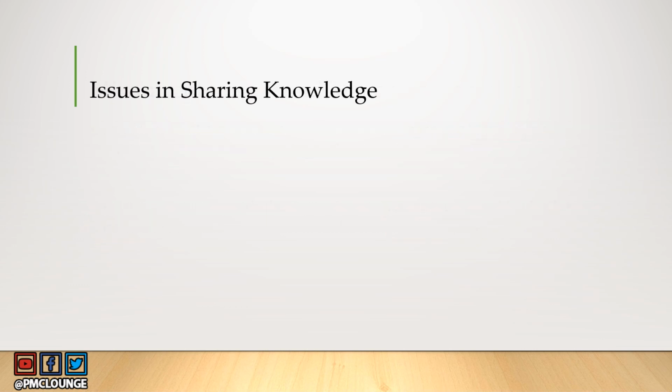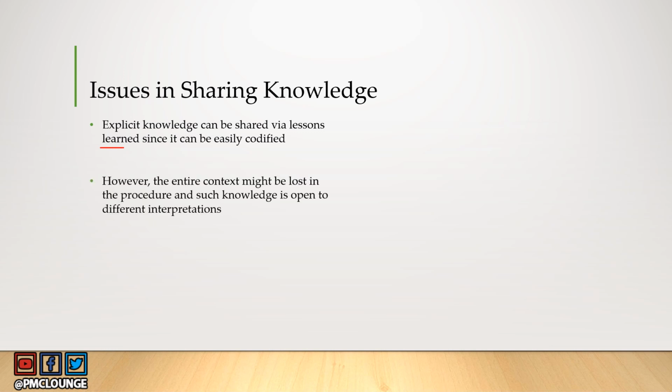Now, some of the issues that you may face while sharing knowledge are, so let's talk about explicit knowledge first. Explicit knowledge can be shared via lessons learned document or the lessons learned register, because it can be easily codified, right? However, the entire context might be lost in the procedure, and such knowledge is open to different interpretations. We just talked about how the security team requires 2 weeks to provide an approval, right? Now that knowledge could be about just one kind of project.